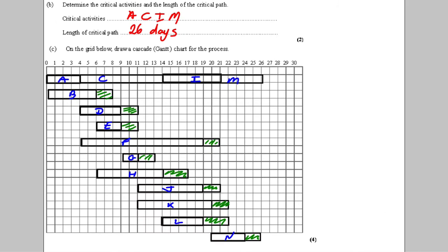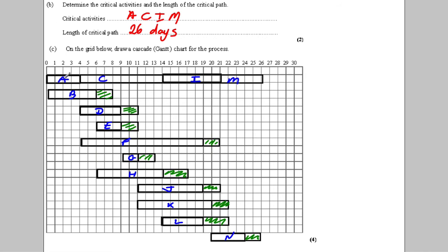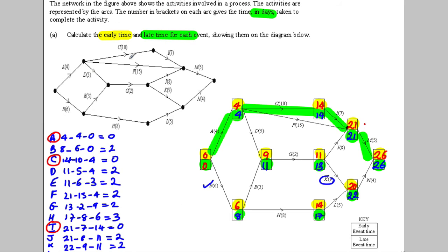Explain your reasoning. It's just helpful. This isn't the answer, but to work out the lower bound. I just always find that helpful. The lower bound, if you add all these times up here, so 4 and 6 is 10, is 13, is 18, is 28, is 30, is 38, is 48 and 53, is 60, is 68, is equal to 77, is equal to 82, is equal to 86, and is equal to 91.